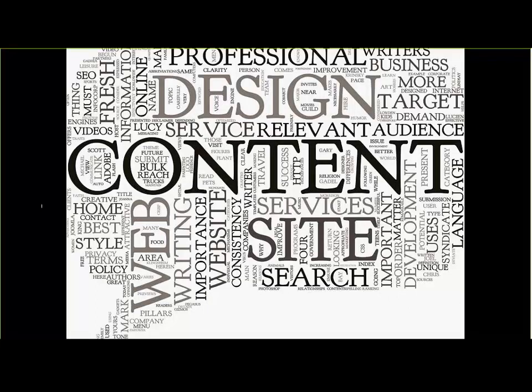True. And one more point that should be made about the content that's related to the project is you want the content ready as early in the project as possible, ideally even before the design begins. Because if you think about it, we're designing the navigation. So if we're adding a lot of pages or an entire new section, that can really make a big impact. So late last-minute content changes can sometimes be a curveball for the project. So everybody just kind of keep that in mind.